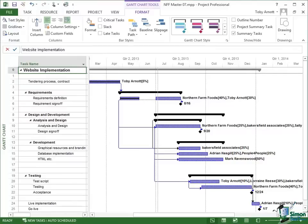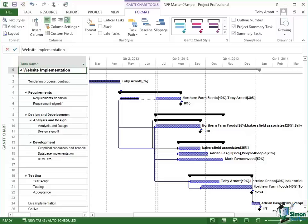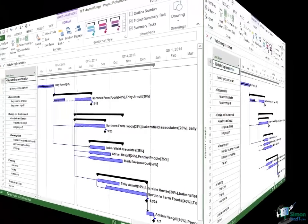Requirement one is that you've actually assigned your resources and costs to your project. Earned value analysis doesn't really work at all until you've done that. If you've only partly done it or if you keep changing it because you didn't do it right first time rather than circumstances have changed as the project has progressed, then you're going to be looking at some pretty much meaningless figures. Make sure that you've got your project in place, your resources assigned, and the other costs associated as well, including things like fixed costs for tasks.